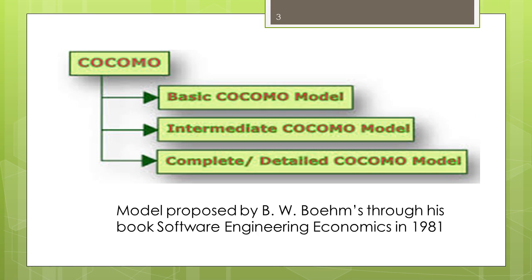COCOMO includes a basic model, intermediate model, and complete model. The basic model aims at estimating in a quick and rough fashion most small to medium sizes of software projects. Because the basic model is limited in accuracy, the intermediate model was introduced. Boehm introduced an additional set of 15 cost drivers to increase the accuracy of estimation in this intermediate model. The detailed model provides a set of phase-sensitive effort multipliers for each cost driver, which helps in determining the manpower allocation for each phase of the project.